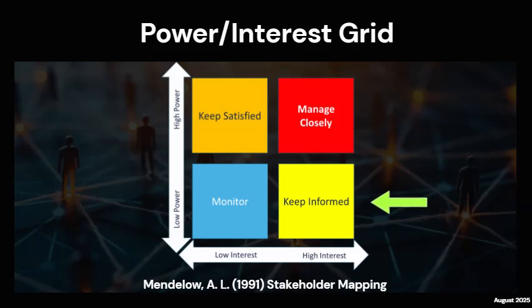Stakeholders with low power but high interest, such as end-user groups, should be kept informed. Their support can make them valuable advocates for the project. Finally, those with low power and low interest require minimal effort. We monitor them.